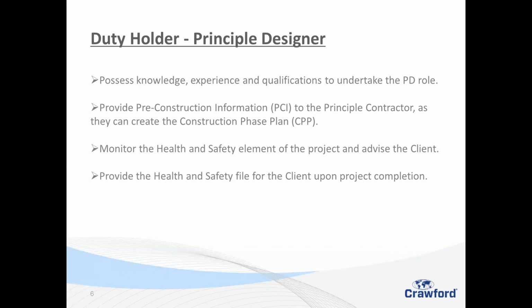At the end of the project, I always ask the contractors to provide me with all the paperwork surrounding the health and safety on that site, and then we collate the health and safety file for the client, and we send the pack out to the policyholder. They can keep safe, and I understand when you sell your house now, it's something that you're asked for.